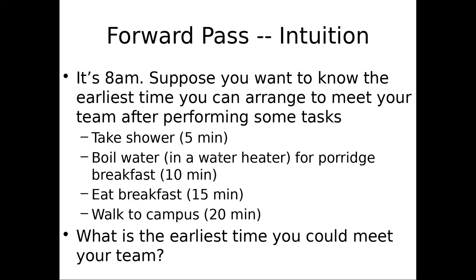10 minutes. And where did you get that 10 minutes from? From boiling water. Good, because it's the what? Of these two, it's the maximum. If this had been 15 minutes for a shower, what would that have been? 15, yeah. It's the maximum of these two. That's going to be key. Since we can't walk and eat, those two are also independent. So good. It's going to be 10, 15, and 20. Yep, and then walk to campus. 20 minutes, yeah, so exactly.